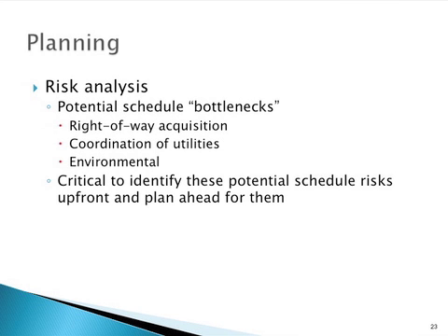The last slide in my section highlights some information about risk analysis. There are several potential schedule bottlenecks. The acquisition of right-of-way could go to condemnation, extending the schedule. Utility coordination involves a series of formal procedures that must be followed to identify any conflicts with the proposed location of the trail, and any relocation required for the utilities can extend the schedule. Any required permits or design changes due to environmental laws and regulations can have a negative impact on the schedule as well. That's why it is essential to identify potential risks to the project upfront and plan for them.